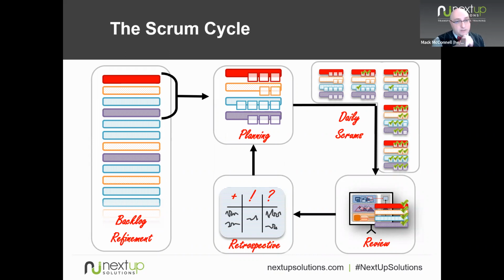So that's backlog refinement. The sprint cycle itself starts with a sprint planning meeting, which is actually 3 different discussions. In the first discussion, the product owner and the developers negotiate an overall goal for the sprint. We call that the sprint goal, maybe unsurprisingly. Then they negotiate which backlog items will get done in the sprint.